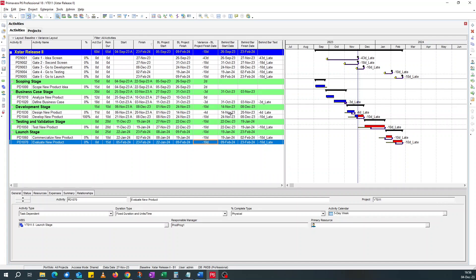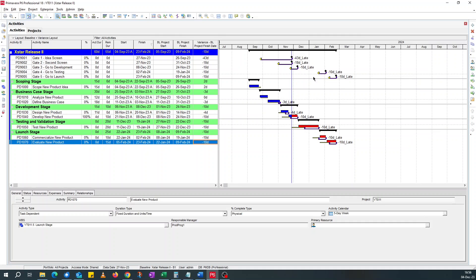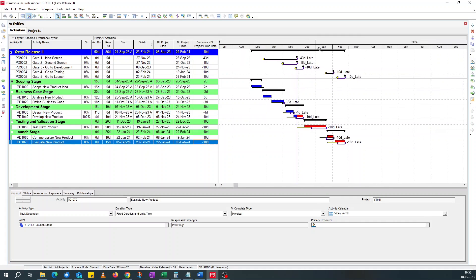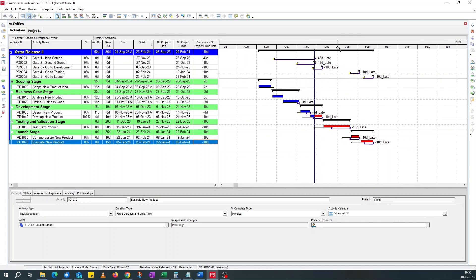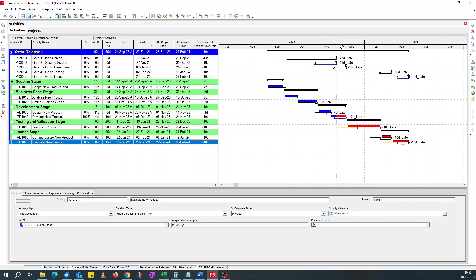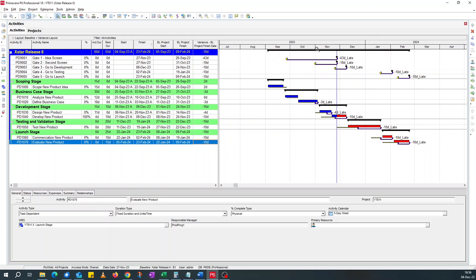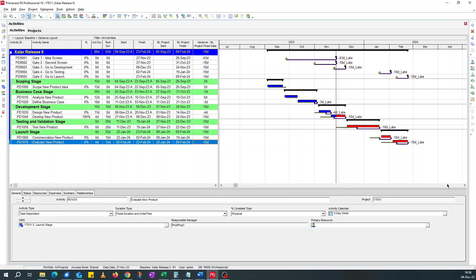So you can hide all these. So a use case for this would be like when you're doing your look ahead. Interactive planning schedule. Interactive schedule review session. Weekly or bi-weekly look ahead schedule review. So like your 14 day, 30 day or 90 day schedule and look ahead review. You can just to emphasize, draw attention to activities that are late and by how much.